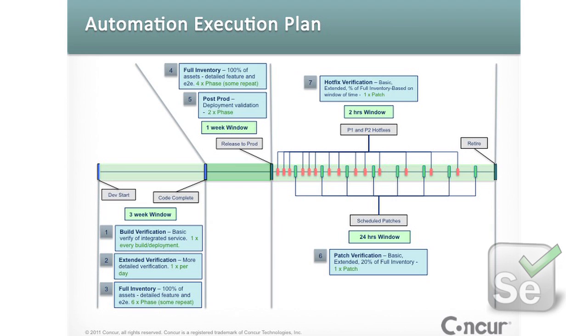In between that release, we have scheduled patches that are smaller in nature. Typically, we don't target major features to go into those scheduled patches. Sometimes they do, based on the business need. Okay? And then, unfortunately, between those, we have a few other fixes that go in. So overall, this is a monthly release cycle. The first phase is 3 weeks of development cycle.